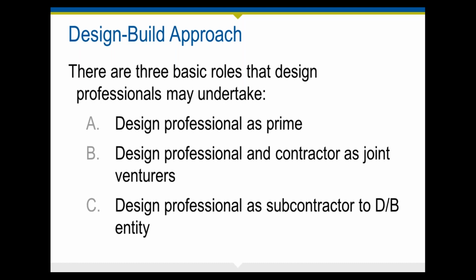So for design firms, there are three different roles that you may undertake. And that will significantly influence the nature and extent of your potential liability exposure. A, you could be acting as a design professional as a prime. B, the design professional and the contractor, the builder, enter into a joint venture. Or C, you could be a sub to the contractor, so that the design firm is acting as a subcontractor to the design build entity.